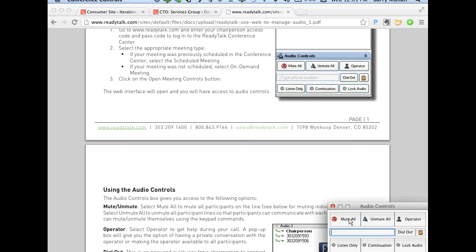And a couple of things that will help: we don't encourage you to have stories where the tasks are boilerplate copies of other stories. The tasks are meant to be quite specific to the story, but it's not unusual for them to be fairly common tasks across stories, and there's a copy task capability where you can say, we've got maybe 3 or 4 common tasks that we do for every story.